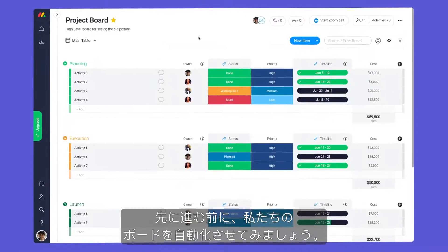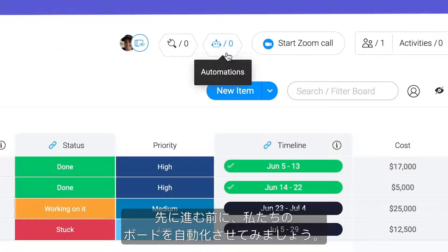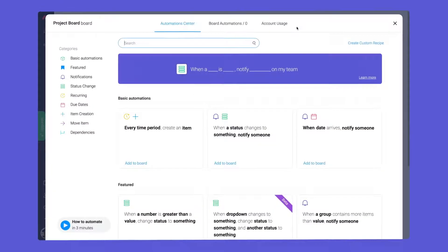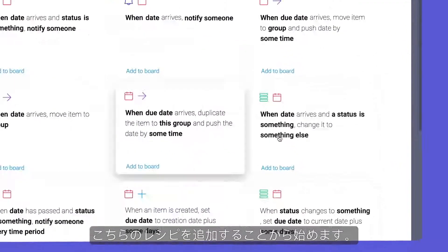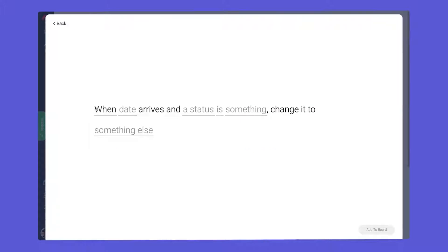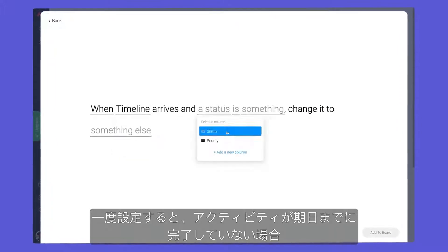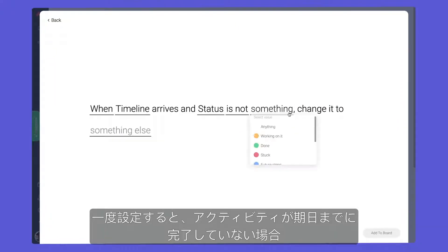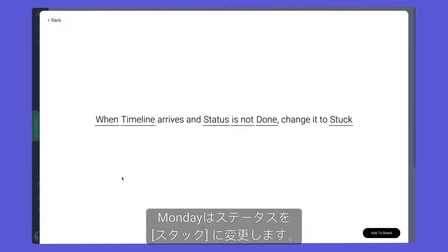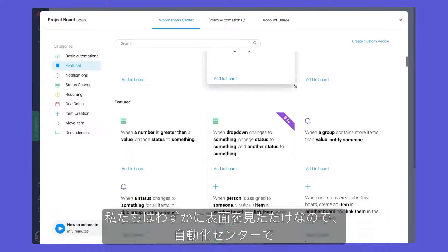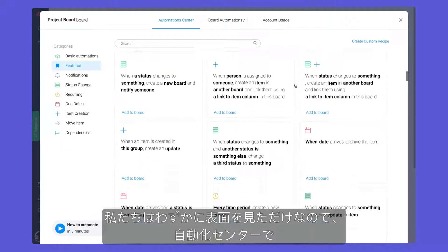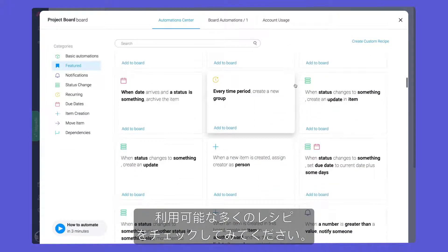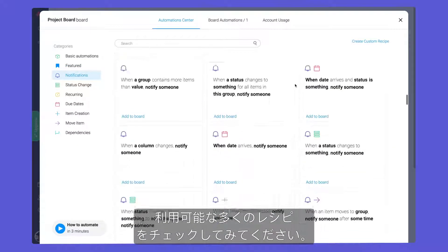Before moving on, let's put our board to work with automations. We'll start by adding this recipe. Once configured, Monday will change the status to stuck if an activity is not done by the due date. We are just scratching the surface, so be sure to check out the many recipes available in the Automation Center.